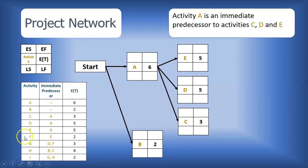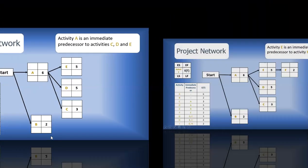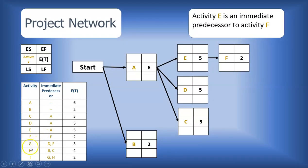The next activity is F, and you will notice that F immediately follows E. Then we have G, and G has two immediate predecessors, activity D and activity F. So we are going to have arrows going from activity D and activity F to activity G.